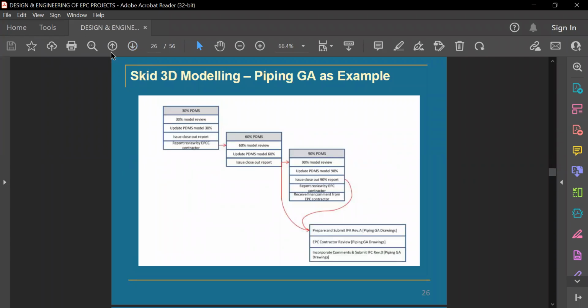And of course, 3D modeling, as I said, PDMS is a software. And if you see here, there are the 3 phases of modeling. Not only piping, but civil, instrumentation and electrical modelers will start working parallelly. They will not work in isolation, not work in silos, but they will have interactions with each other, and as a team, they will start modeling the complete plant.